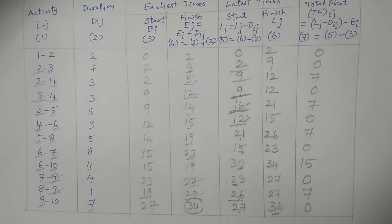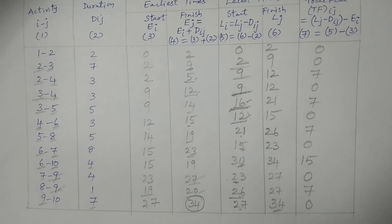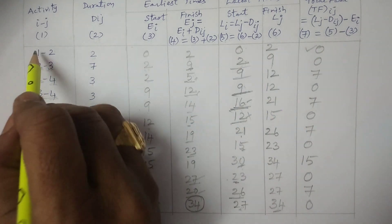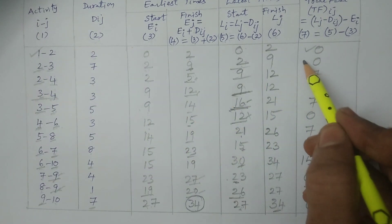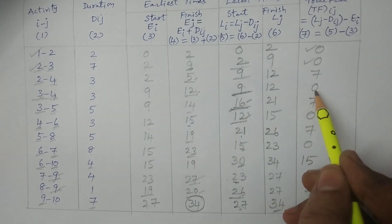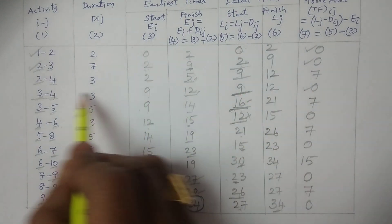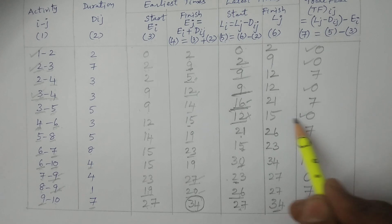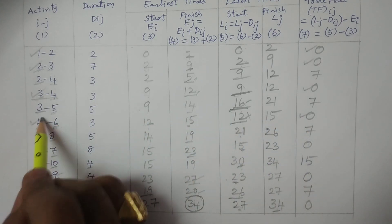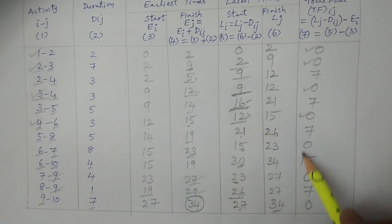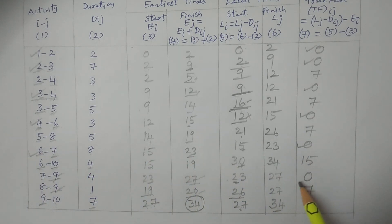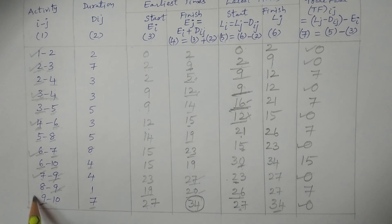Observe the zero values of total float. The corresponding activities are called critical activities. Zero total float corresponds to activities: 1 to 2, 2 to 3, 3 to 4, 4 to 6, 6 to 7, 7 to 9, and the last activity 9 to 10.